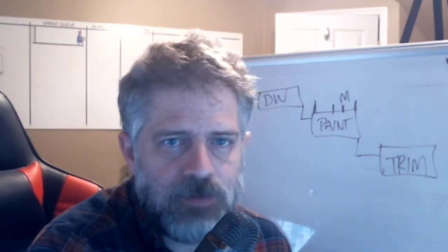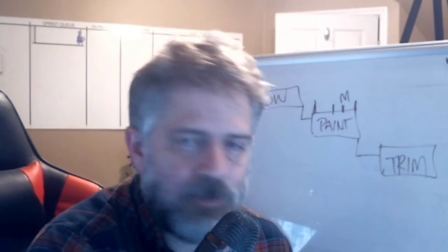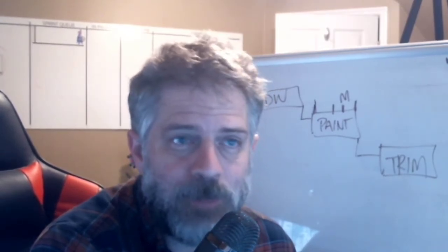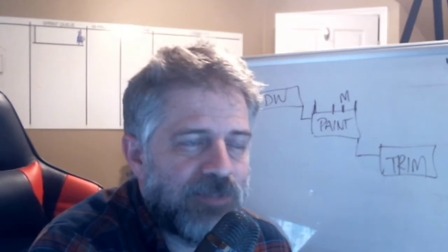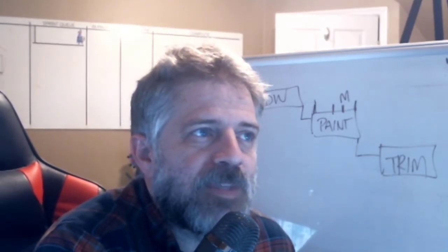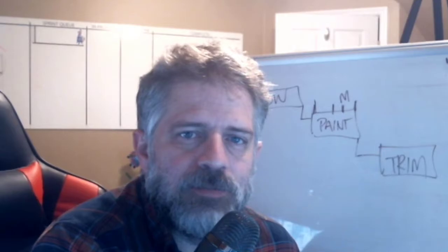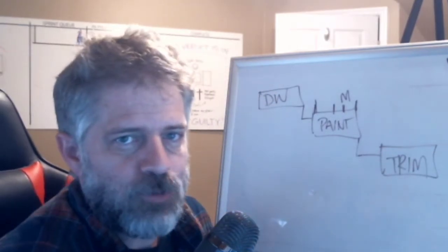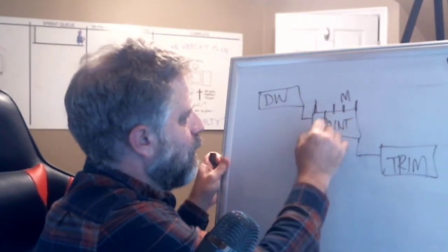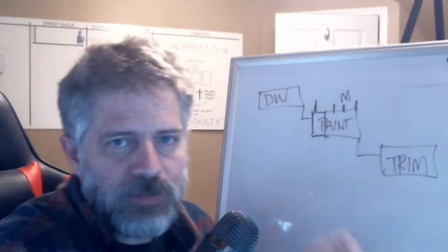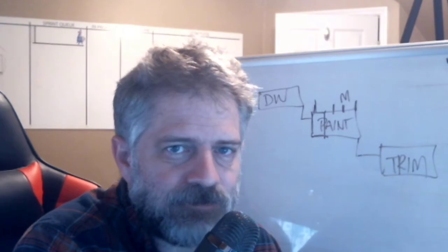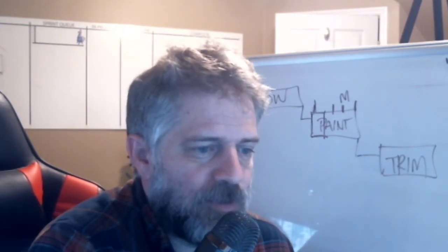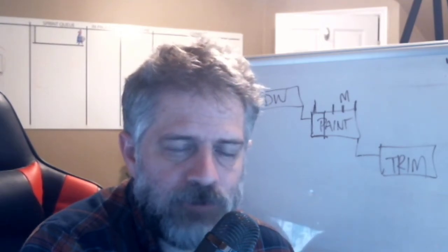Well, then he gets to Tuesday, and he's like, man, we're still finishing up this job. I've had this exact conversation 50 times with just a painter, let alone all the subs I've dealt with. And I still know we're in the margin, but see, he's consuming the margin. He's consuming the margin at the beginning. And then all too often, he was supposed to come in Tuesday, and it ends up being Thursday afternoon before he finally shows up.